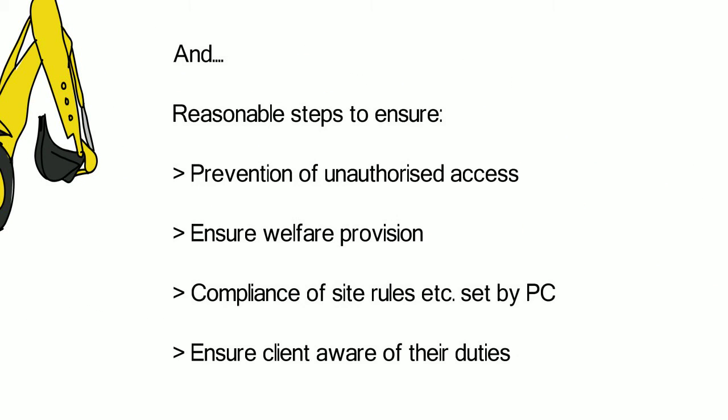A contractor must not begin any work on site until reasonable steps have been taken to prevent unauthorised access to the site, ensure welfare provision complies throughout the construction phase, and ensure compliance with all directions and rules provided by the principal contractor. And they must also ensure that all their staff are aware of their duties in regard to this.